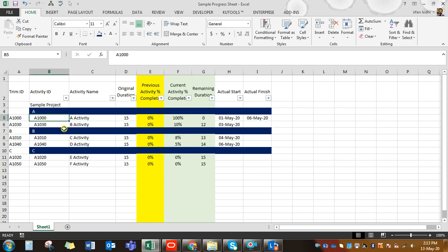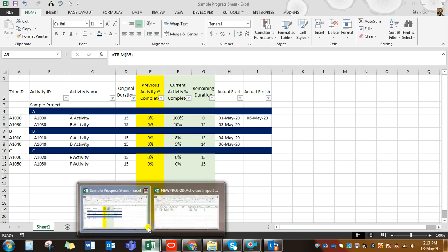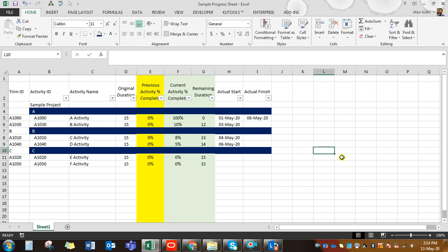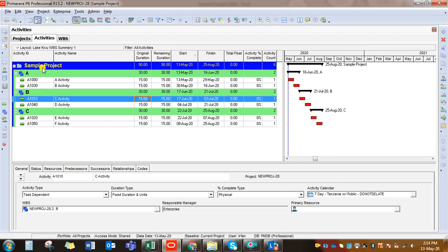When you copy activities with the blue 'B' from the program, it normally has a gap in the activity ID text. We are going to use VLOOKUP to pull percentages from this file into the exported file. That is why we added another column and applied a simple TRIM formula — it removes the gap before the activity ID, which helps us look up values correctly.